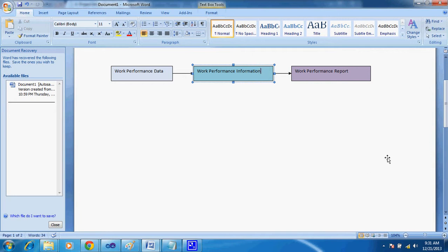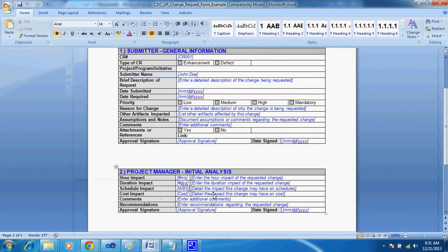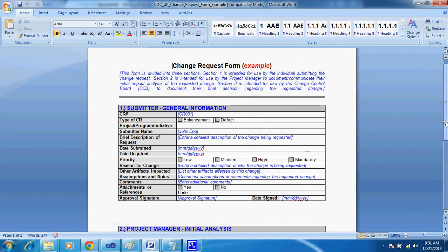So with this background, we will next look at the format of the change request, which will give us an idea of what the change request covers, or what is the process involved in change request approval or rejection. This is a format that I picked up from the net. A change request has submitter information. The submitter can be a team member, because while doing some work I can uncover, oh, this has been missed out, or this is not as per requirement.